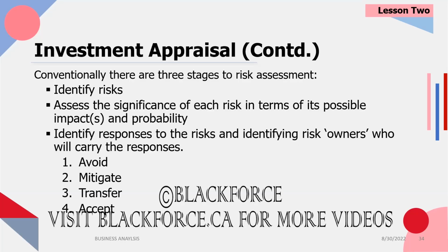The third thing is you're going to identify responses to the risk. Assign a risk owner to every risk. And the risk owners are the ones who are basically responsible for the risk. They're monitoring the risk to see if it will happen. And if it happens, they know what to do to address it.